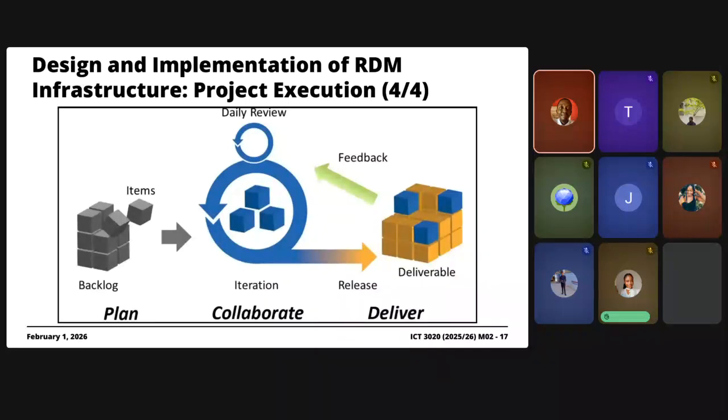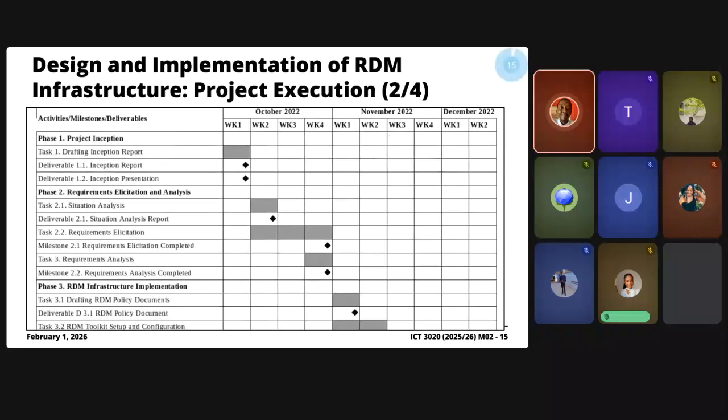One of the fundamental ideas around techniques like Scrum or agile techniques is that you deliver the product iteratively. So in this particular case, we are saying we're going to build this platform over a span of 3 months. What we did with Scrum is we break apart the 3 months into what are called sprints.